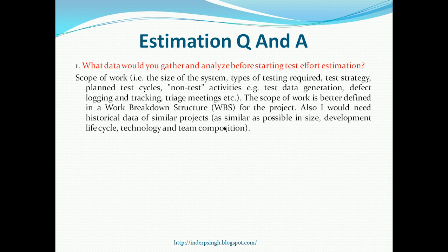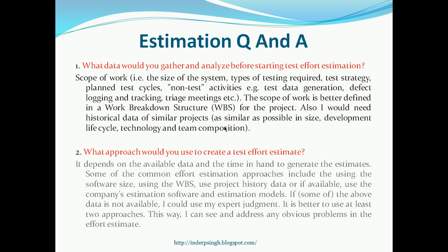The best approach to use is the work breakdown structure because it gives you a very accurate estimate. The second question is, what approach would you use or prefer to create a test effort estimate? Well, it depends on the available data and time at hand. Sometimes we have great amount of data available and sufficient time is there, so then we can go for the detailed approach, for example using the work breakdown structure.